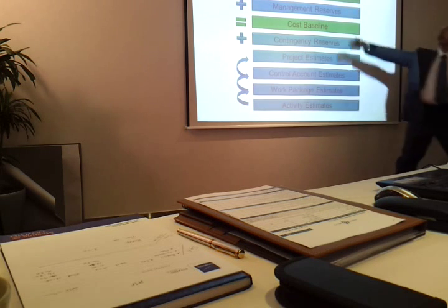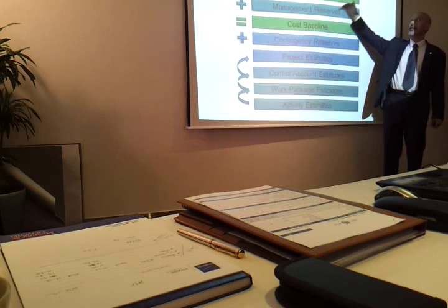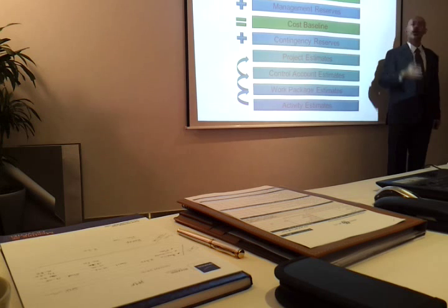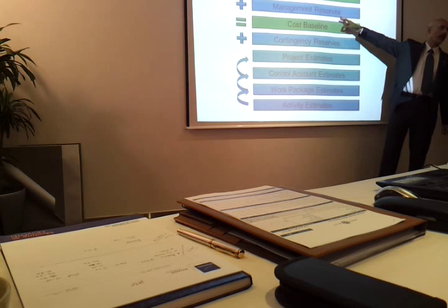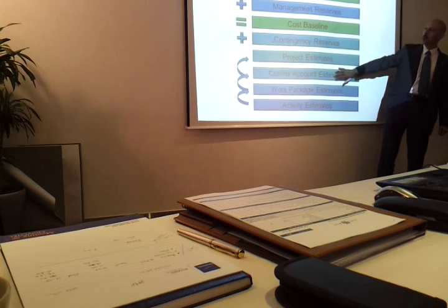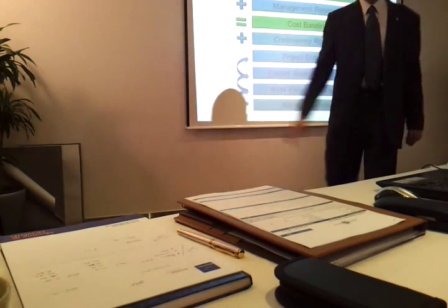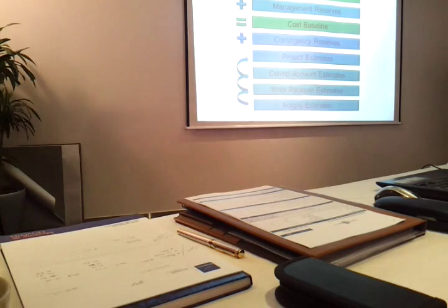That gives me, of course, the cost budget. So there's a difference, guys, between the cost baseline and the cost budget. This is just terminology for your information. For you as a project manager, this is what you're concerned with. And the project sponsor usually doesn't tell you about that. They like to keep it secret. But if you struggle and you spend all your reserves, you go begging to the sponsor, and they really should. They have to make funds available for you.